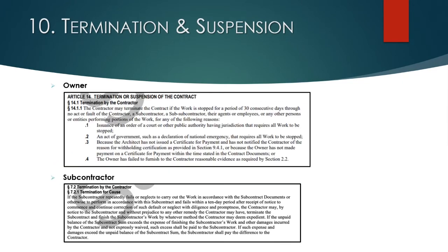Here are some examples from the AIA. I'll just point out a few things. Termination of the prime contract by you as the GC requires 7 days notice to the owner and architect. And your anticipated overhead and profit is recoverable with this language in the standard AIA.